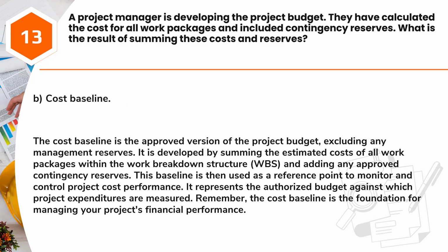Answer: B. Cost baseline. The cost baseline is the approved version of the project budget, excluding any management reserves. It is developed by summing the estimated costs of all work packages within the work breakdown structure, WBS, and adding any approved contingency reserves. This baseline is then used as a reference point to monitor and control project cost performance. It represents the authorized budget against which project expenditures are measured. Remember, the cost baseline is the foundation for managing your project's financial performance.